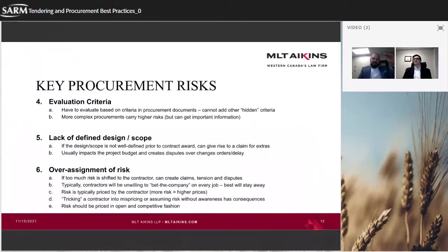They gave as much weight, let's say 25 points, to a financial item that averaged around 25 grand, as to a financial item that was worth 3 million. And in that case, it creates a very real disparity between the relative importance of these items.